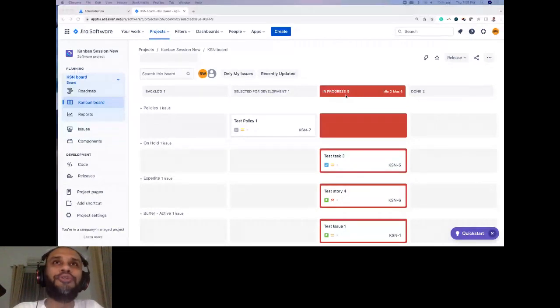That's good. So that's actually something that I've seen also. There are some teams that actually add a column saying on hold. Yeah. Right. So now that will not affect your in-progress WIP limit, right? It will directly move. You can move your ticket into your on-hold column. Perfectly fine, right? So that's how you are visualizing your workflow. Perfectly fine. I'm just showing options, right? I'm just showing options. Good.